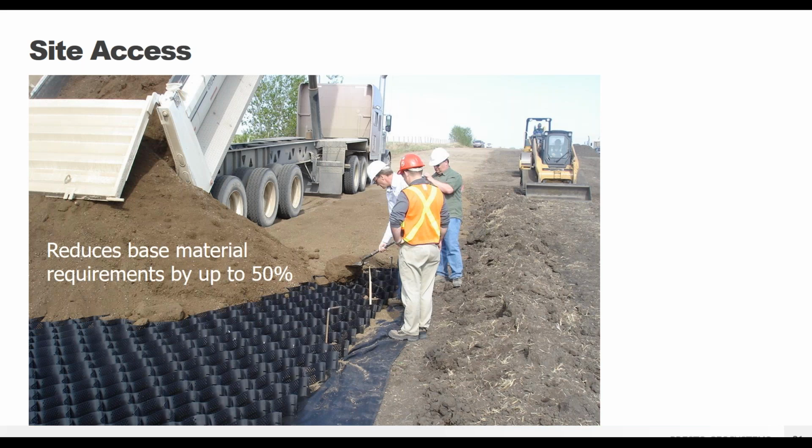In this case, they were able to use readily available on-site sand infill so that they didn't need to buy and truck in expensive aggregate. So they were able to save on material costs, hauling costs, even CO2 reduction because there was less driving needed to bring all the materials in. So all sorts of good things to consider. And like I said, depending on your project needs, you can reduce your material requirements by as much as 50%. So huge savings there.